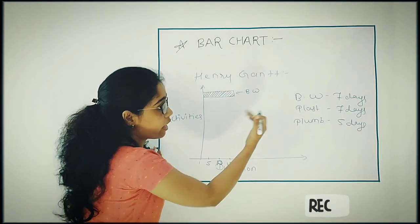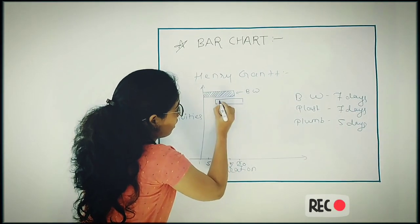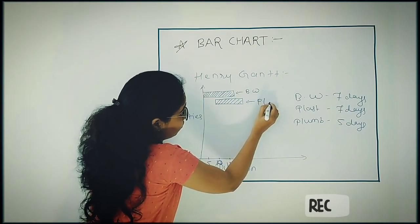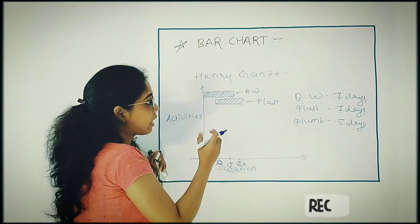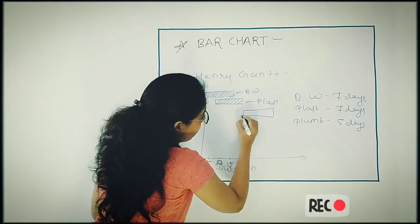Likewise, I will draw the next activity. Suppose after finishing three days work of brick work, I will start my plastering work. So let this be your plastering activity. Then plumbing—I will start after finishing plastering. So this is your plumbing activity.